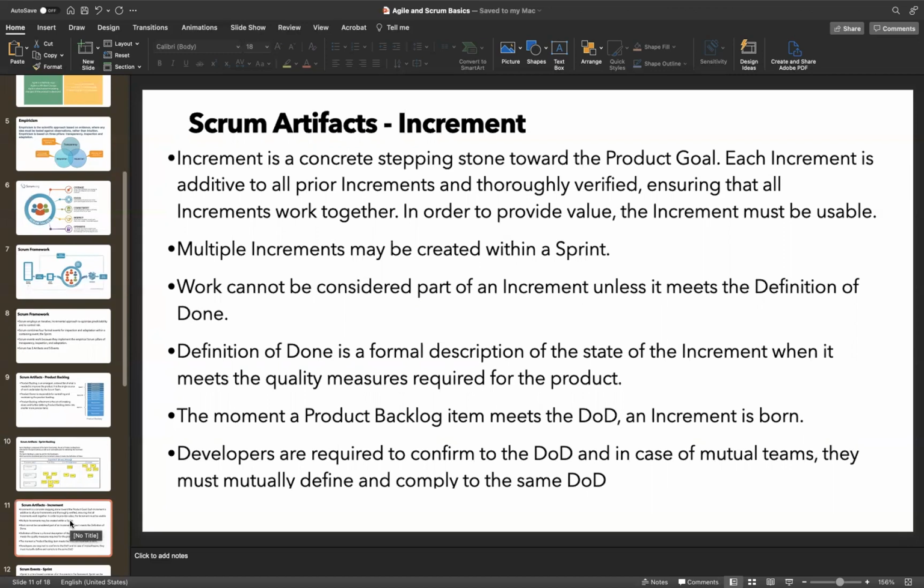Definition of done is a formal classification that this particular work meets the acceptance criteria from the product owner. Acceptance criteria are both quantitative and qualitative. For example, if I need a website developed where the customer is able to order from the shopping cart and my vendor is able to invoice, I don't care about the payment option, as I can use cash on delivery right now.